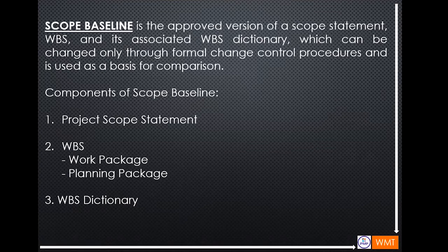So actually, what I'm currently doing in my project while dealing with our subcontractor and client with some healthy arguments is that the scope baseline was not properly discussed and there was no common understanding of what the scope baseline is before the project start or before an activity start. Which leads to the activity delay and eventually cannot meet the required completion date. So that's why the scope baseline is very important in a project.